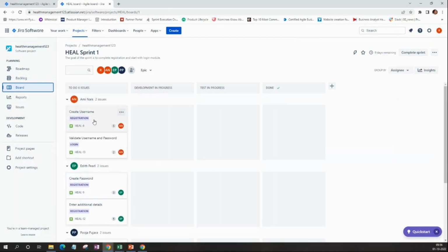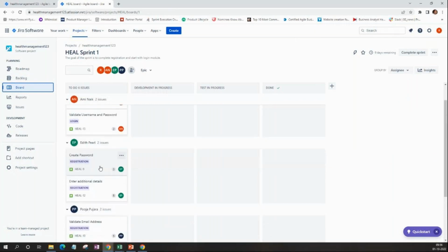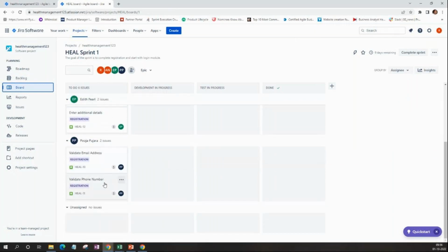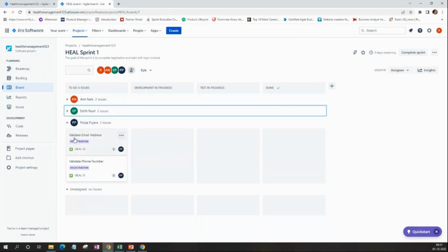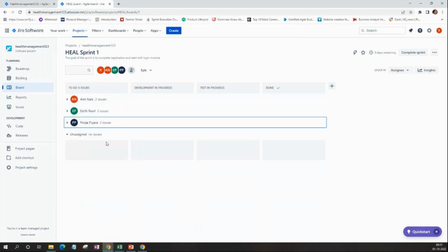So Ami has two, Pearl has two, Pooja has two. So this is how it is done. In the daily stand-up meeting, we can go one by one. Ami gives an update first, and then Pearl, and then Pooja. So in this order, we can go. Make sense? This is how your board looks now.